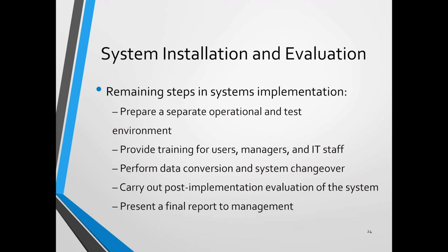will be ready in the new system on the 2nd of January, because you as well, during the New Year holiday, want a holiday too. Normally, if you don't want to work during the New Year holiday, for the data of the 29th of December as the month end of December, you have two choices. First, you run a batch job online, maybe on the night of the 29th or the morning of the 30th when no one uses the old system. I mean you can download the data from the old system,